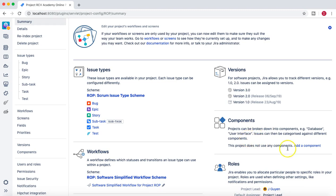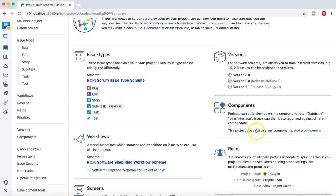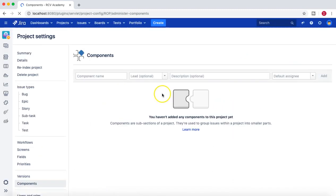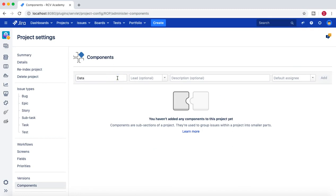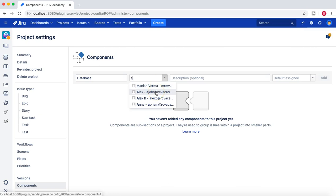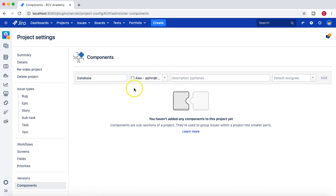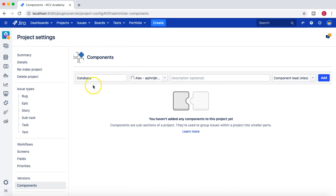To define a component, go to the component section of the project and click 'Add Component'. You can provide the name — for example, 'database' — and then provide a lead. For example, if you have a database team with a person leading it, you provide their name. You can also provide a description and the default assignee, which is why I'm covering components in this tutorial.